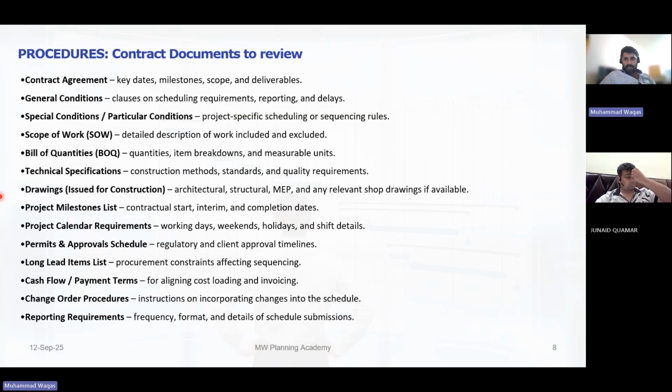Why can't we make it by air? Or why are we asking this for air? Because air will charge you more, right? You can do the same by sea also, but it should not be at the last minute where you have to do it by air. You can be proactive and call it 2 months before and then deliver it by sea, no problem.